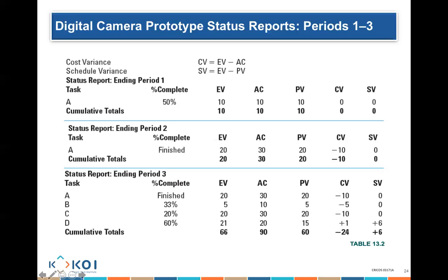So because my schedule variance is positive, what does that mean? What does a positive schedule variance mean, guys? Ahead of the plan. Ahead of schedule. And what about a minus 24 cost variance? What does it mean? Over budget. I am over budget.